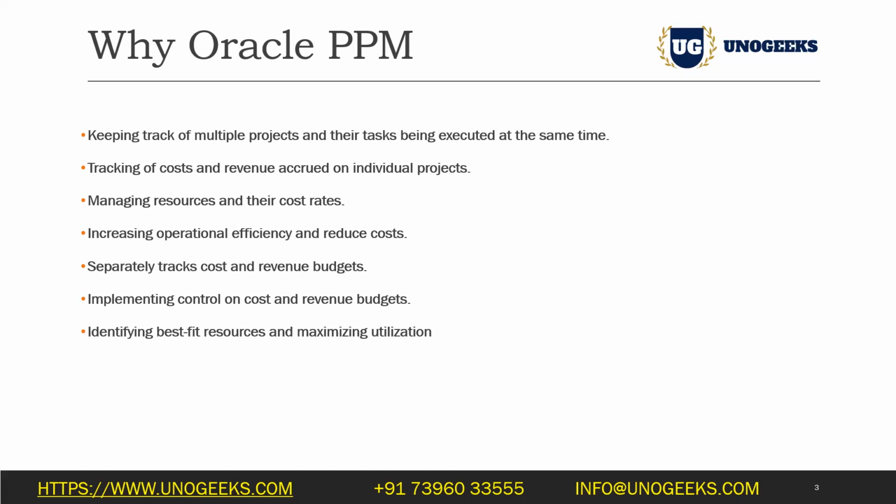Let's say the workshop sessions are expected to complete by 5th of November. And now it's 1st of November and it's still only 10% completed. We were given a time of 15 days to complete this, and now only 5 days are remaining. So obviously this phase or this task or this progress is under red, and the system will tell you that you either have to hire some more resources for this task, or you need to expedite. You need to increase the hours which each resource is spending on this task.